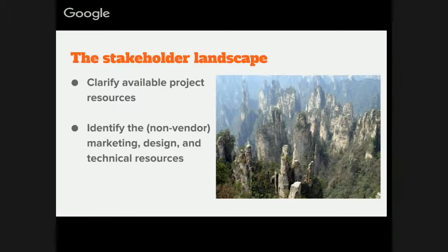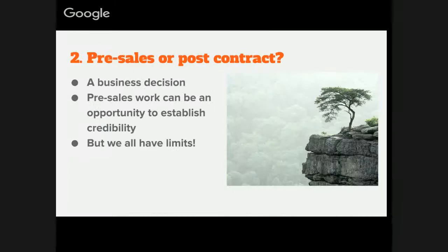And just understanding, given the scale, being really direct in terms of saying, this is an important thing. You need to hire a copywriter, and that needs to go on the timeline and really account for that. So that's just one example, but there are many where understanding the stakeholder landscape and the gap between what it is and what it needs to be is really essential.